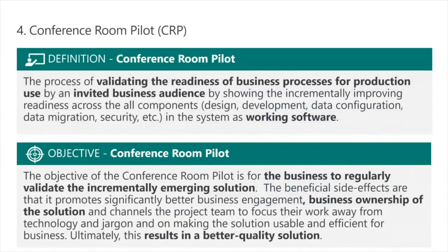Validating by the conference room pilot. This is a key step. And I've seen projects sometimes at the end of the sprint, especially if they're a little bit behind, think, oh, maybe I can skip the conference room pilot. I'll catch up with it on the next sprint. Don't do that. The sprint is not complete until you've done the conference room pilot. The conference room pilot is part of the sprint. And the sprint ends when the conference room pilot is done.